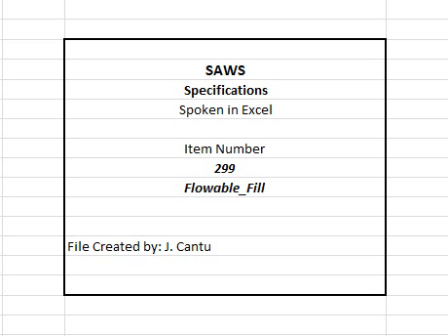maximum trench widths as established per SAWS construction specification item number 804, schedule of pay or as indicated on the contract plans and is for full compensation for furnishing, hauling, and placing materials and for equipment, tools, labor, and incidentals. The use of flowable fill around manholes as per specification items 850, 851, 852, 853, and 855 is incidental, and there will be no additional separate payment item for the material.